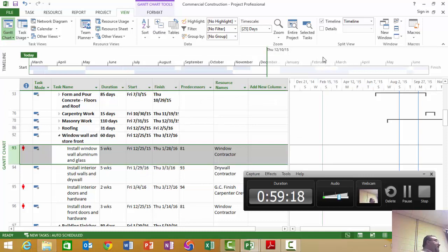In other words, instead of the individual classifications of workers in the crew and the different pieces of equipment, they just said, all of that's in one crew, boom. So all you could really manage resources by was crew. And I think that's not a very good way to resource load a schedule, because you want to know exactly how many people and machines that you're under-allocated for, over-allocated for, and so forth.